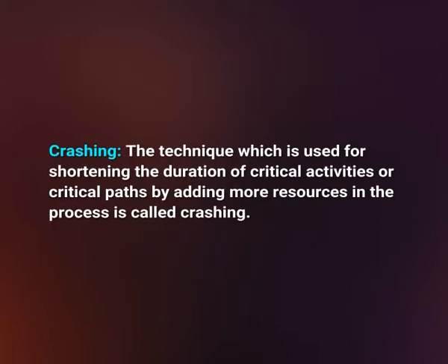Crashing. The technique which is used for shortening the duration of critical activities or the critical path by adding more resources in the process is called crashing. PERT chart.